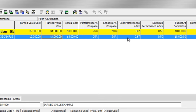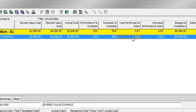I can also use the cost performance index, also known as CPI. This is calculated by dividing earned value cost over actual cost. Again, a value of less than 1 indicates that my actual costs have exceeded what I've earned. Another way to interpret this CPI is that for every dollar I spent, I only actually accomplished $0.67 worth of work.